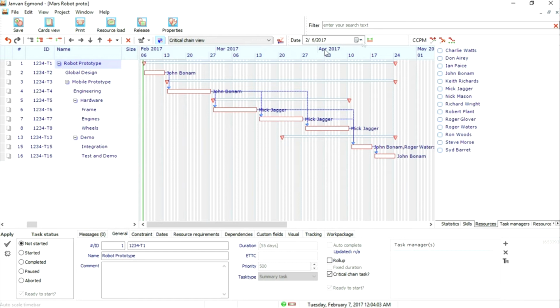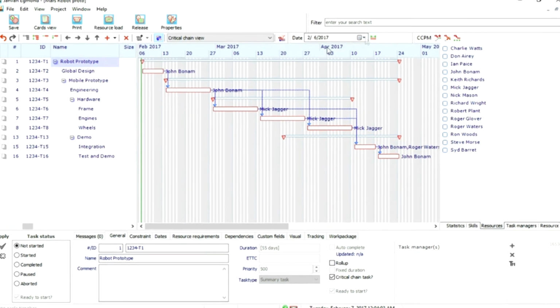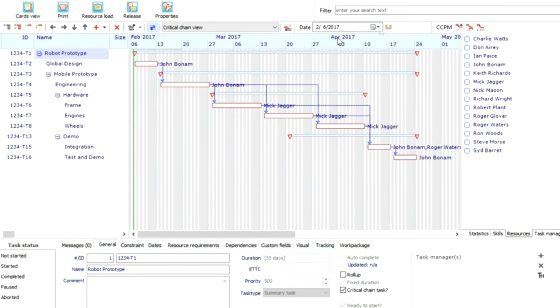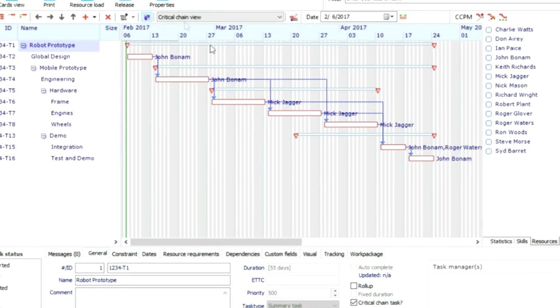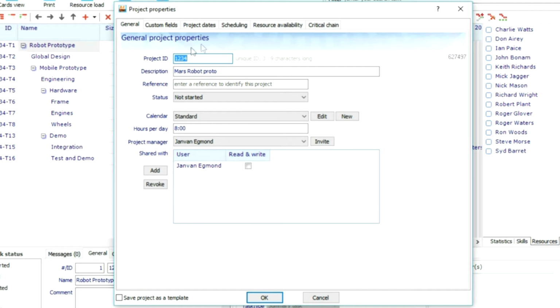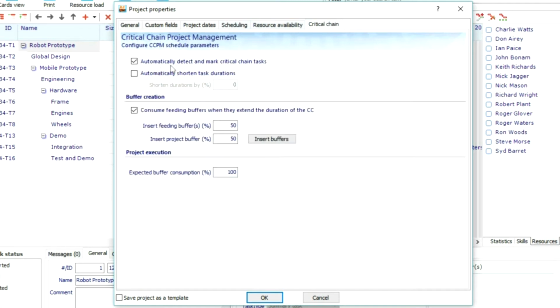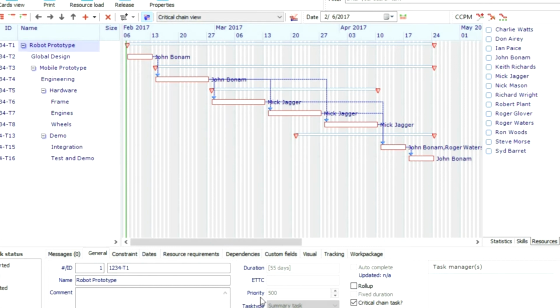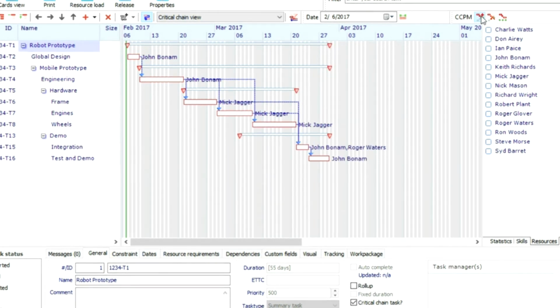Creating a critical chain plan is not so difficult. We start with converting a safe schedule to an aggressive schedule. An aggressive schedule is a schedule with less safety reserves. And we can do that easily by shortening the duration of the task. In this case, we take 33% of the task duration as a safety. We reduce the safety of all tasks in this project by just shortening the task time duration for each task. Now we have an aggressive schedule that contains less reserves.